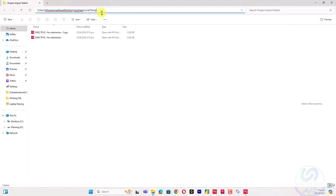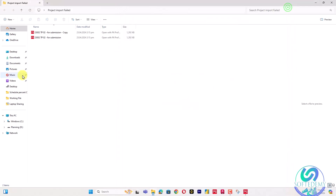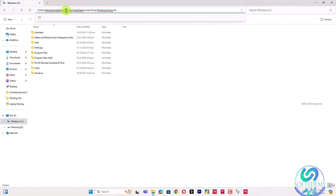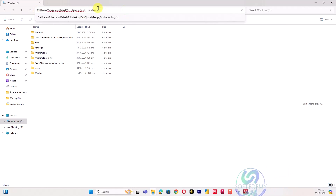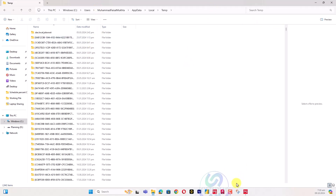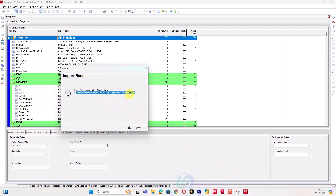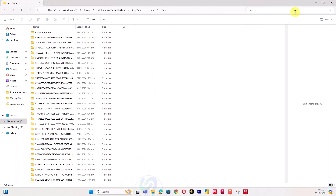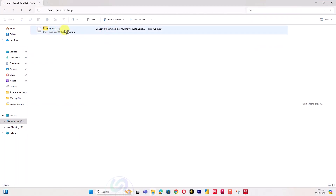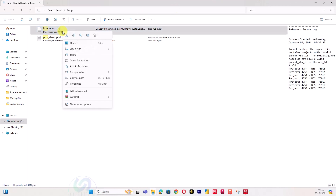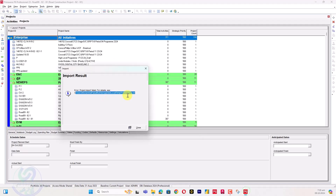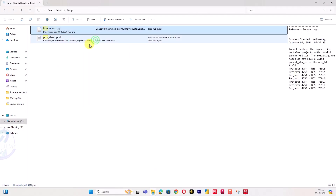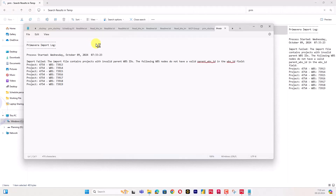Let's copy the log file location shown in the error dialog, paste it into the file browser, and navigate to the temp folder. The file name is 'prm_import_log' — this import log is always created. Search for 'prm' to find it quickly. Also check the timestamp to confirm it matches when you ran the import. Open the file 'prm_import_log' that matches the time.